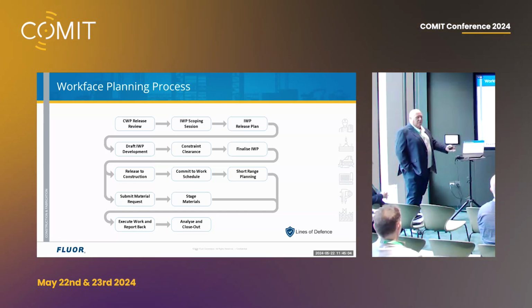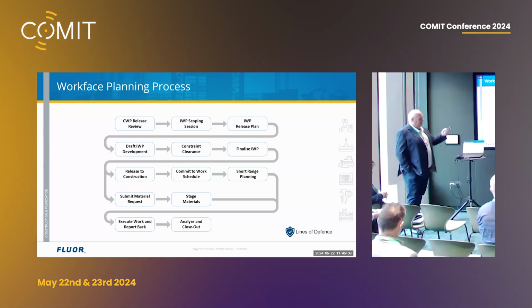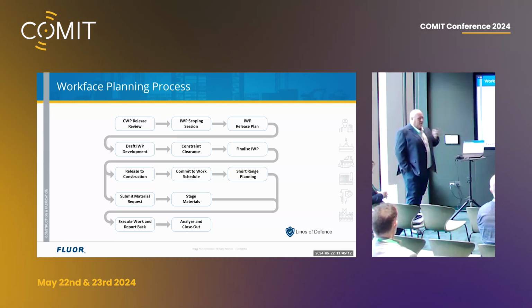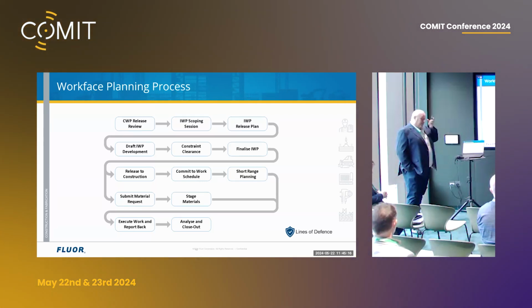Did you do it? Was there a problem? Because we always want to know what that feedback is. Really, you could say the analyse and closing is a punch list. Don't wait for commissioning, do a punch list when you finish the work. Put it into a next IWP or one in a week or two's time.